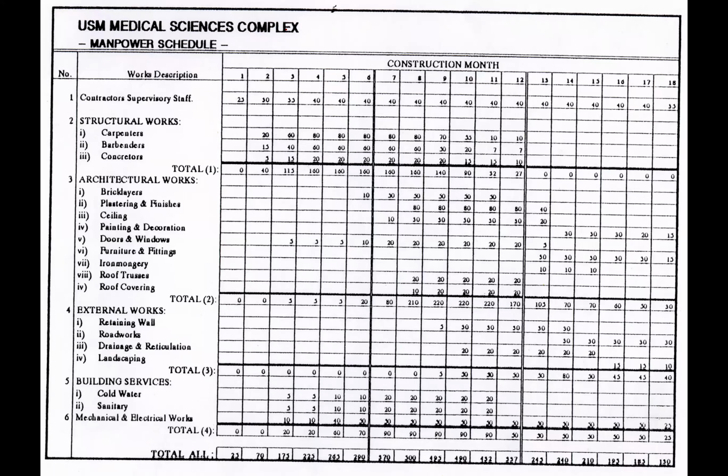And then this one is based on workers, manpower usage. You notice bricklayers, 10, 50, 50, 50, and 50. Why is there variation of workers? Due to the fact that this project submission already went through a revised version. Maybe when you did the first draft, your resource utilization might not be good. Then you do the resource smoothing, etc. You will end up like this, where the values look very nice. Why? Because this could be the final version.